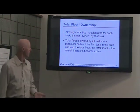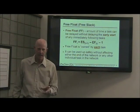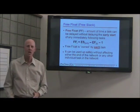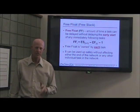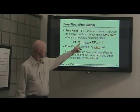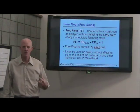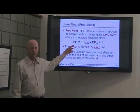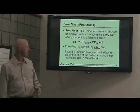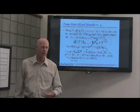To contrast that, free float is owned by the individual task — it doesn't get shared. Free float is the amount of time you can delay a task without delaying any successor task in the schedule. The calculation is simple: take the early start of the next task minus the early finish of the current task, minus one. That gives you the free float value for that task. It's owned by the task and will not impact anybody else in the schedule.